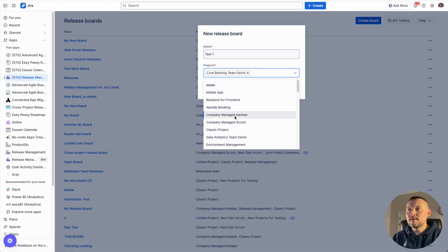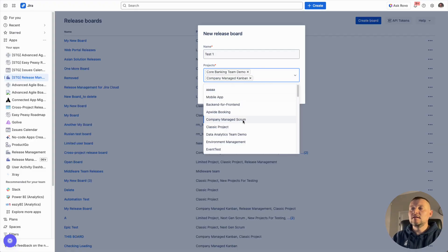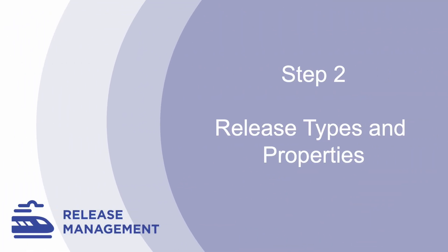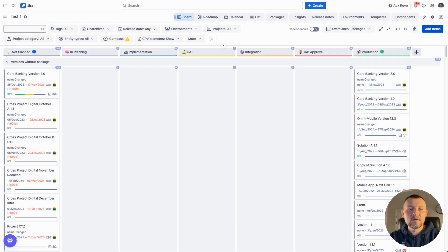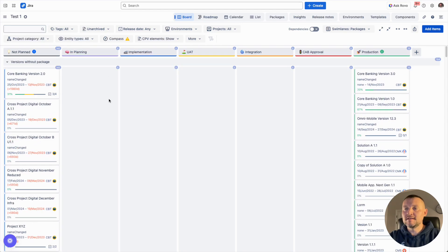Let's select a few of them. As a result, all the projects and their releases will be visible on the board. As soon as the board is created, we will start seeing all already existing releases from selected projects. All unreleased releases will be moved to a 'No Plan' column. All done releases will be moved to production, so we could be able to see the initial set of releases.